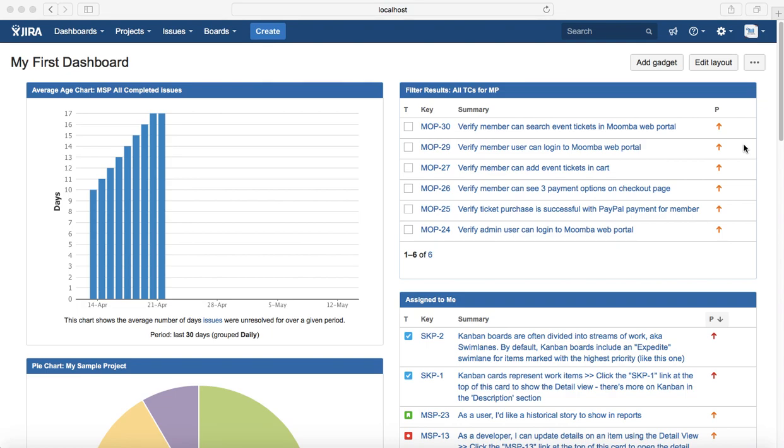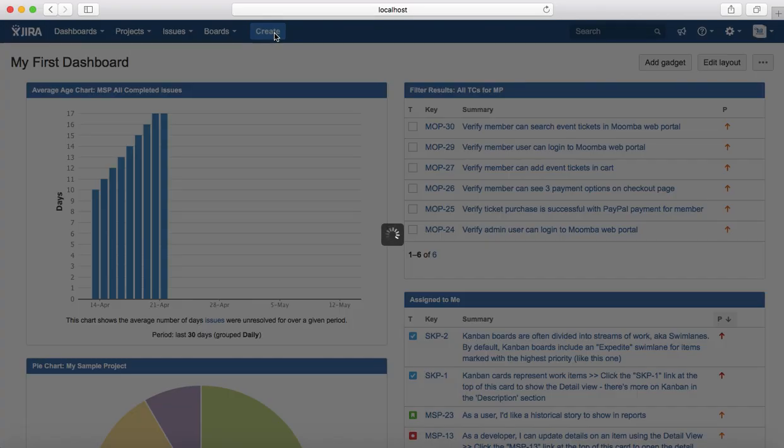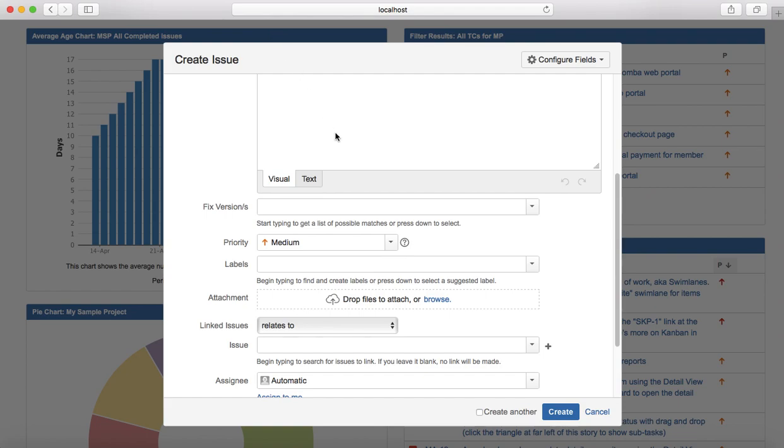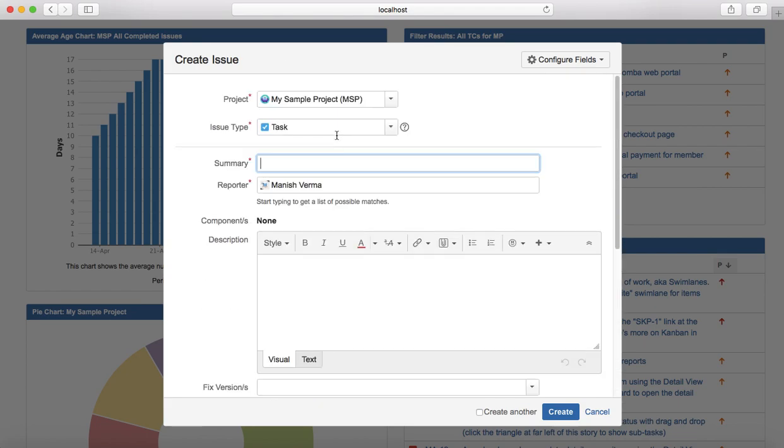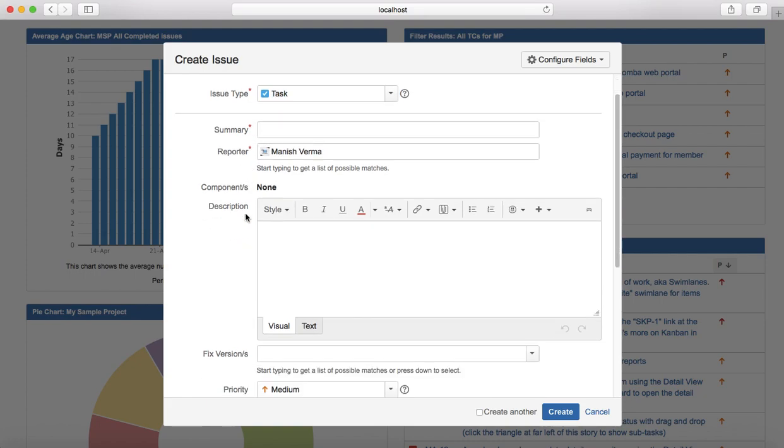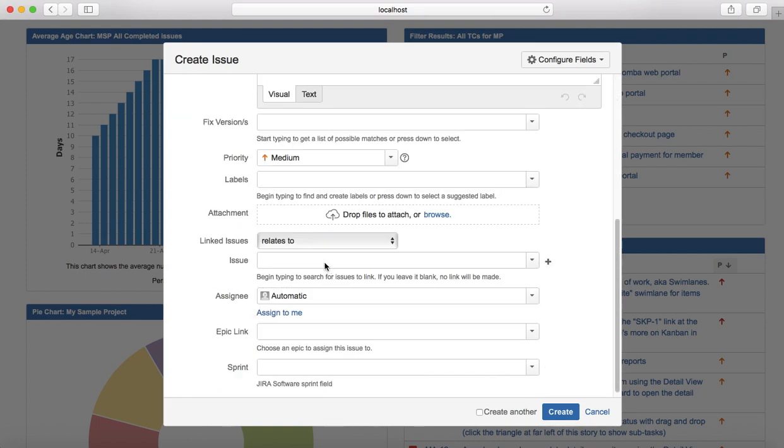To create a task, you just need to click on create button, and from the dropdown here in the issue type, you just need to select a task and then provide the rest of the details: summary, reporter, description, etc., and click on create button and it will create a task in Jira software.